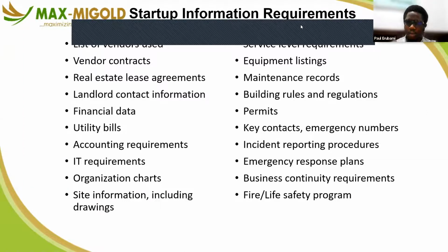You don't even know how many ACs you have, what the capacities are. I should come and count them. No problem, I'll come and count. But what I'll give you as my quote is a risk-based approach to pricing, because there are so many unknowns. So I'll give you the highest price possible.